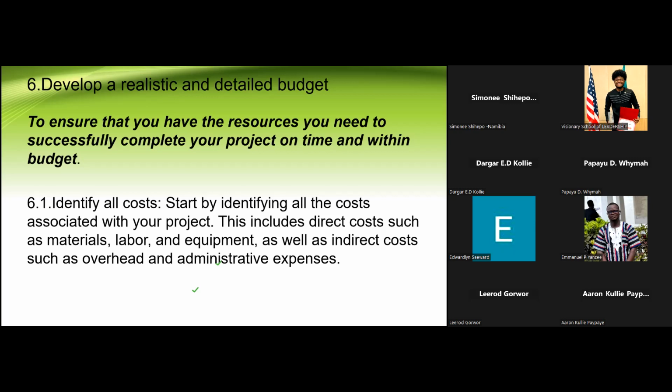What do we do? We look at the individuals we have in the finance department already. If the staff is enough and there's somebody already working with grants funding, we attach that individual to this grant as well. So this individual is now handling 3 or 4 grants, and there's a level of